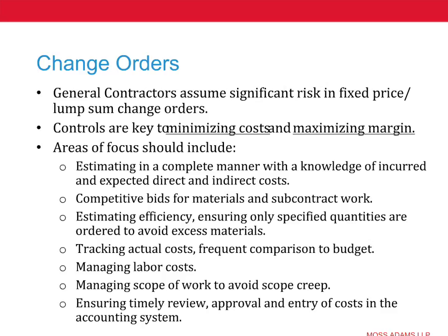As auditors, we say if it's not in the system, it's not something you really can bill, it's not reimbursable, and it doesn't help support your change order processes either. So it's going to be real important to have a system that captures all your costs.